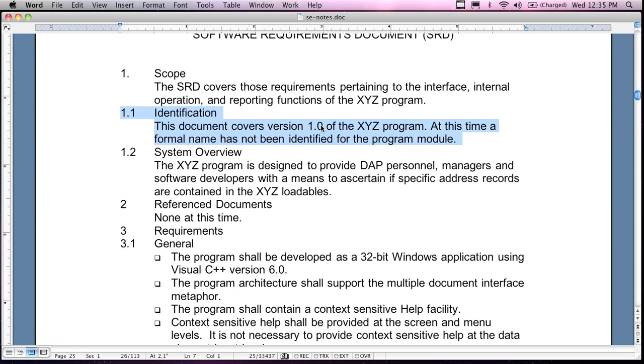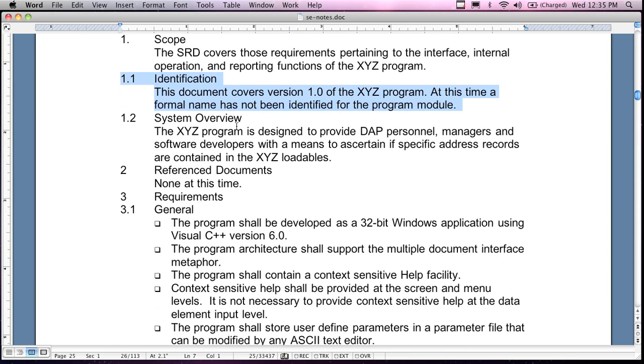But showing you as an example, in this particular case, you might have different versions of this requirement spec. You might have one version that has these 3 features, another version that has 4, or one that has 2, or one that has 1. Because then you have choices, alternatives. And maybe the customer only has $10,000. And so if this one's $10,000, if you can come up with an extra $5,000, this one's $15,000. You can use them as different pricing scales, different feature lists. So the versioning helps you identify. And if you put the identification in there, it's kind of like self-documenting source code, or internally documenting source code.